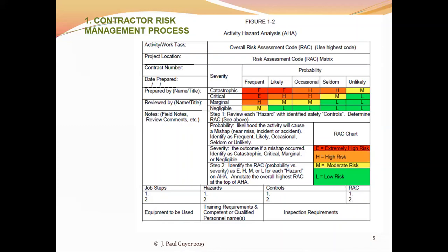And you've probably all seen these plenty of times. It's a bar chart, and it shows that the first thing you do is grade the site, and second, you can't start building the foundations until you get the site graded, and on like that. A typical construction project schedule does a pretty good job of defining the features of the work for you.